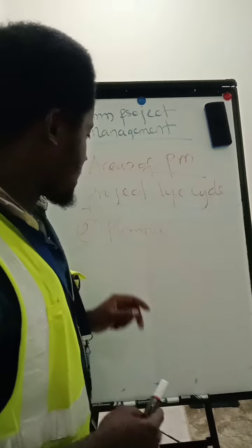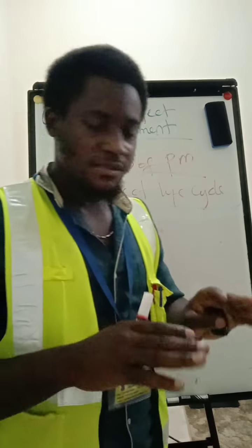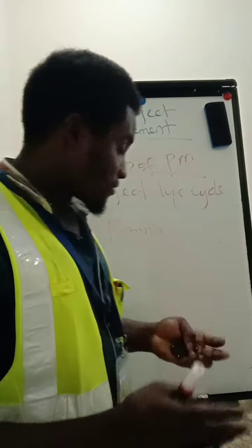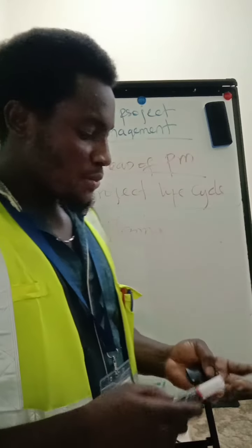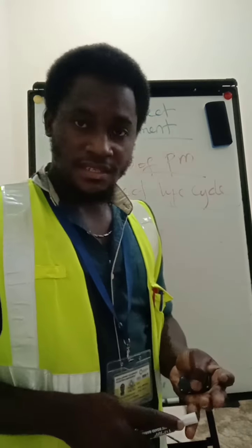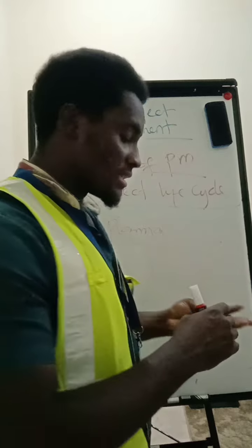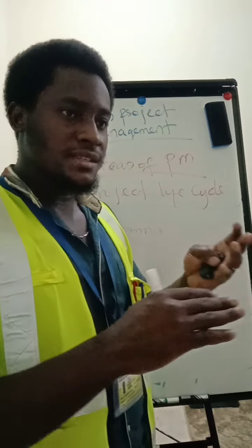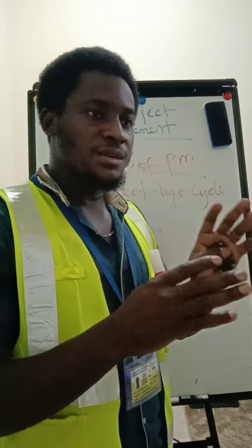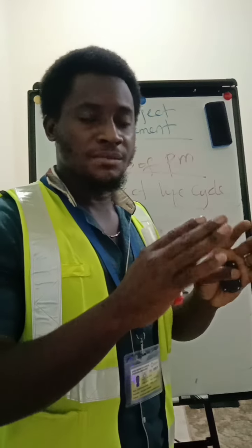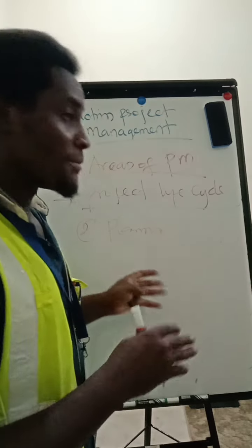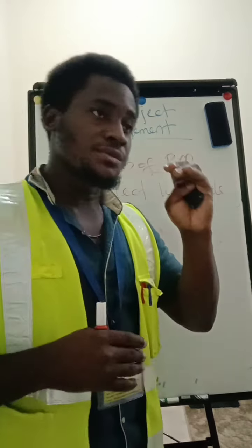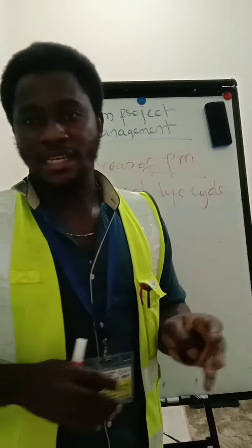Next, we'll prepare a work breakdown structure for the planning. So we'll prepare the different activities. I'll give an example of the construction industry, where we have a design phase, which we are going to monitor. We'll look at the possible steps we'll be taking in order to carry out design, from the pre-design to the final design, coordination with the different MEP services and all that. Then we prepare the final design.